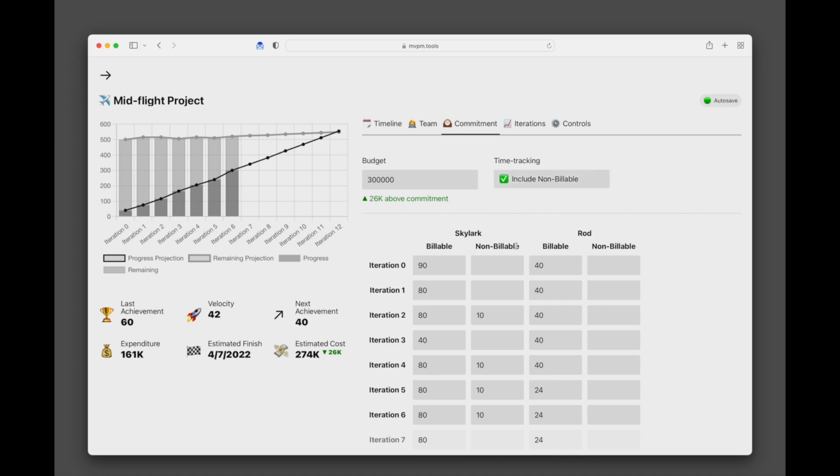It comes in handy when you have team members who simply aren't billable for some portion of the project, but it's also useful for team members who have a tendency to work non-billable overtime. Now, I'm not here to encourage or discourage overtime, each to their own after all, but when it comes to tracking velocity, understanding how much work is going into the outcomes being produced is absolutely essential. Velocity is speed and direction, and speed is distance over time. Distance is story points completed, and time is conceivably the number of hours, or minutes or seconds, that went into achieving those story points. If you're only tracking the billable portion of hours worked, and your team is secretly working twice that many hours, then as soon as they stop working so much overtime, your velocity is going to inexplicably drop.